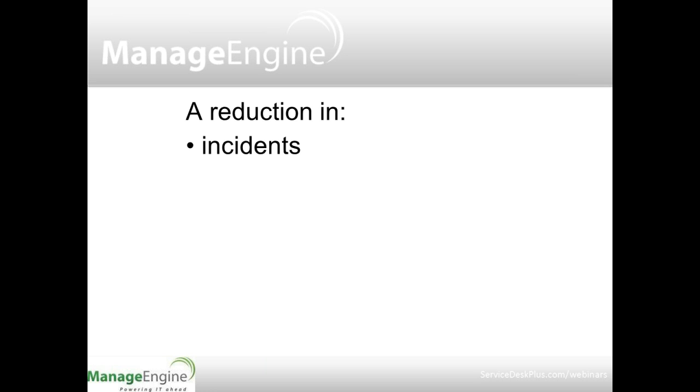So you think about new systems or major upgrades to systems, to services rolling into production. If these systems aren't operationally ready, then what traditionally happens is that we generate this huge wave of incidents. So the service desk phones suddenly start running hot because perhaps there hasn't been the proper training of users, and users are confused and wondering about what this new thing is, or the system's buggy, of course, and it's functionally broken. So for a number of reasons, as a new system is introduced into production, we can get this wave of incidents, of things that need to be dealt with.